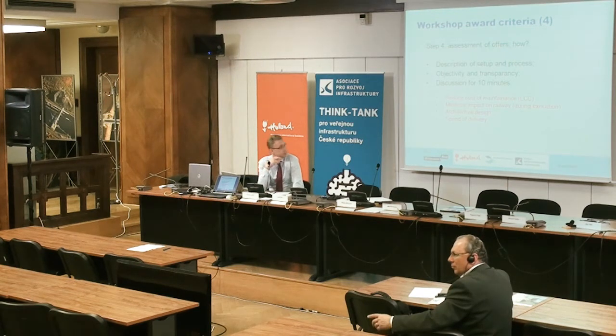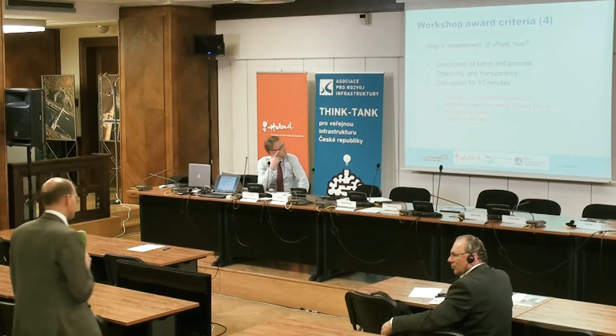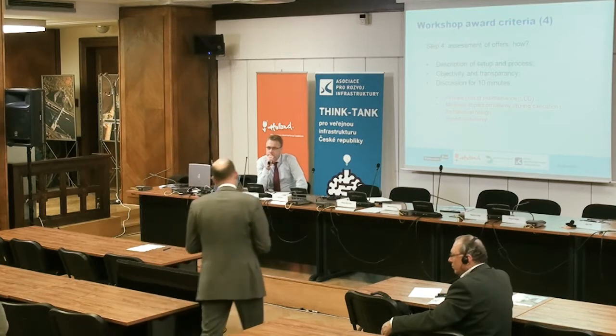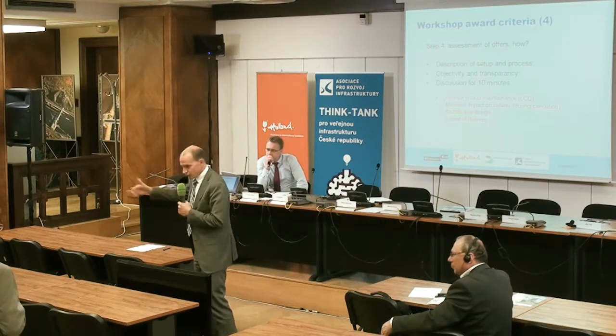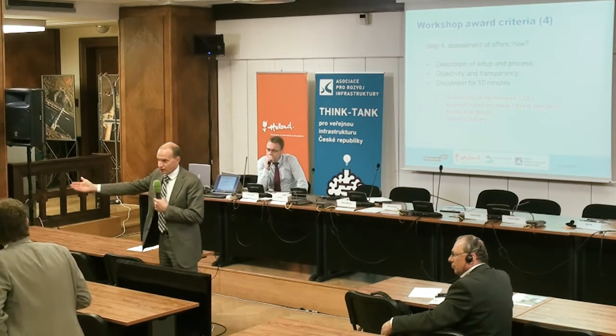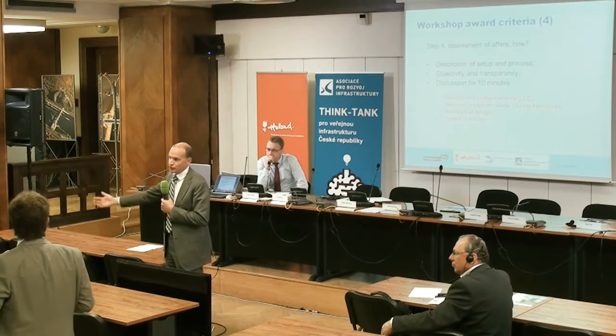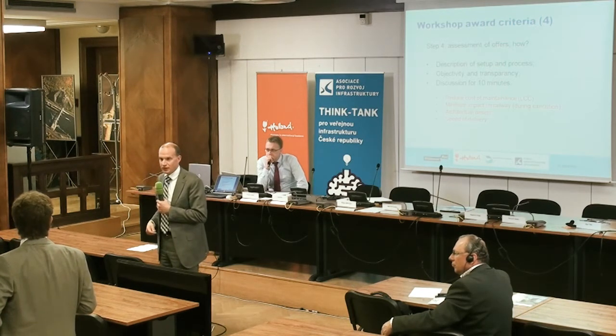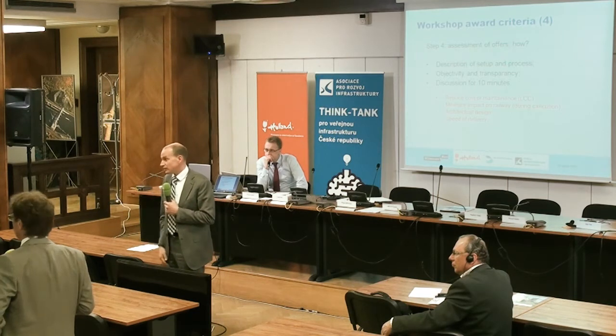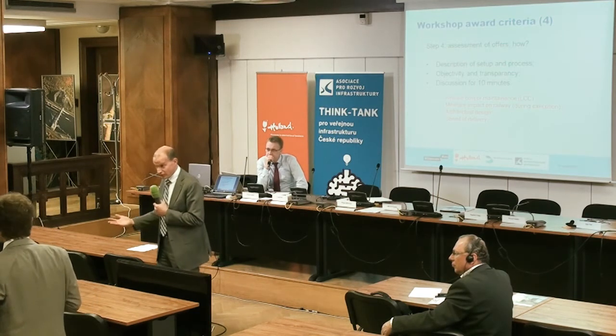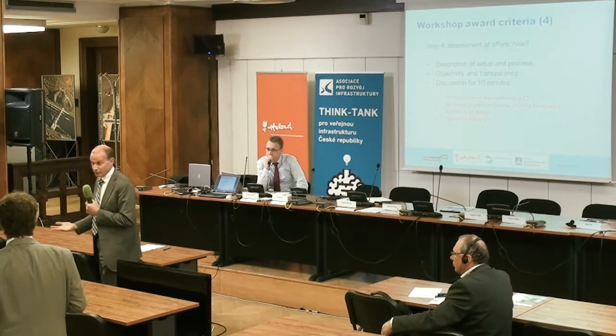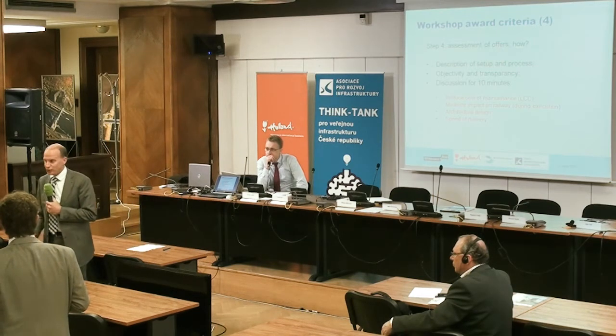I think that's very straightforward and simple. Days or weeks. Let's say that government agencies set a certain date that it had to be finished, and they are finished so many days earlier, or so many weeks earlier, so many months earlier. That's very straightforward, very objective as well. Who will go to court over this criterion? I think it's very objective.